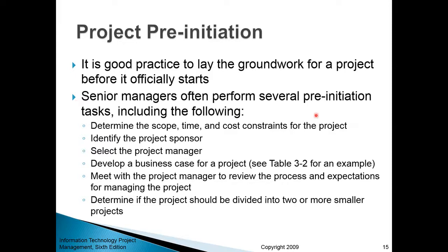So they perform such pre-initiation tasks as determining the scope, time, and cost constraints for the project. What is the total budget that they have available? What is the latest date when this project needs to be delivered? Identifying or appointing the project sponsor, meaning the senior executive who will be in charge of this project, who will be providing the selected project manager with all the needed resources, and also political support within the organization. Then the project manager needs to be selected before a project is formally initiated. Then maybe a business case should be developed, and there are some examples of a business case in your textbook, and there are also templates available.